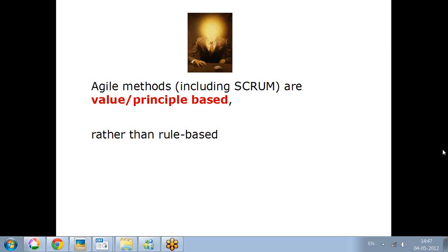So this is the case with IT projects also. One product can be simple, we may finish it fast, so velocity will be very high maybe. Another product where the product itself is very complex and big, the velocity can be low. Or if the team is doing high quality work, maybe velocity may be low.